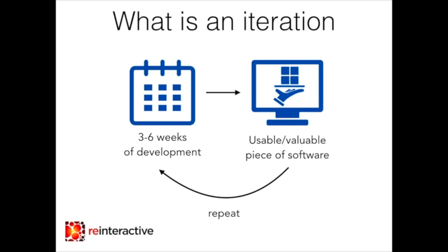And that also helps with your estimation abilities. Estimations have a history of going wrong in software, and that's because it's very difficult to estimate accurately based on the limited information that you have at any one time. And so by keeping the iteration nice and short, we make sure that we're not going to drift too far off our target.